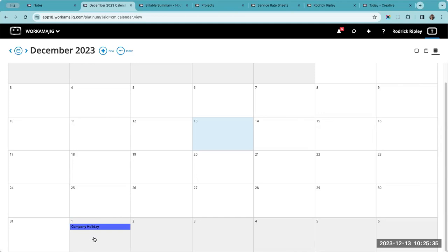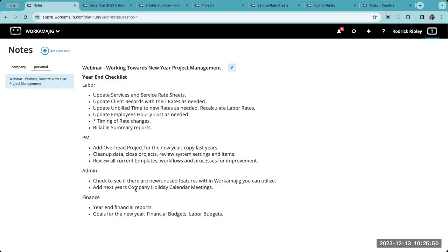All the project schedules will bypass this day. So if I had, let's say, a 2-day task starting on the 29th, it'll now end on the 2nd, because it's going to skip this day because it's a holiday. So that does help to plan ahead for any PM functions that you might have.